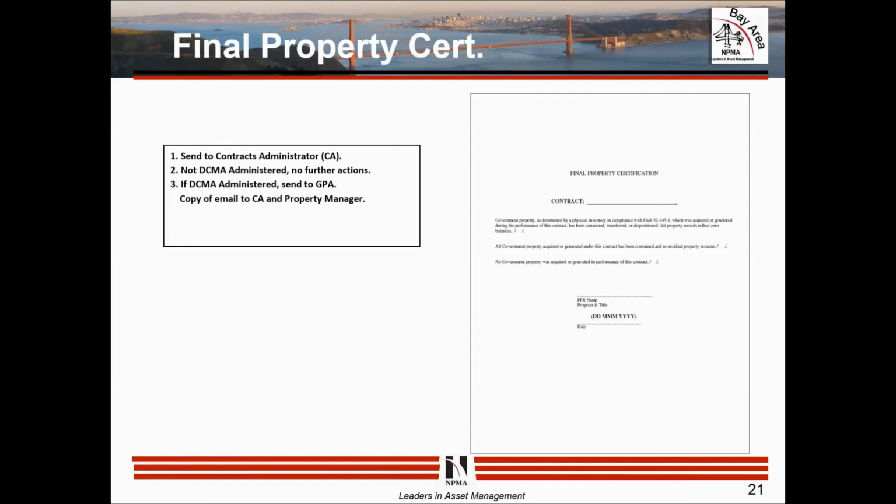The PA was doing a good job making sure it was the new one, and we went back and found it, and because it was on a central SharePoint site under our central SharePoint contracts group, we were able to do that very quickly and efficiently. So, one thing we also do is we mark the contract as closed in the property systems contract table. I don't want someone trying to build a new record on a property that's closed.